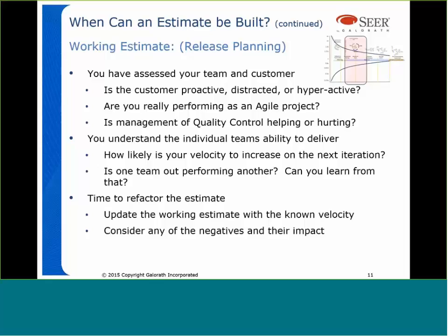A lot of organizations with quality control, they feel kind of left out, especially in the mil-aero world. The QC guys, the quality assurance folks, they tend to feel left out, and they want to get their fingers in the pie. One of the most brilliant things I've seen done was a very large aerospace company down in Texas. What they did was they sent their quality control folks, the QA folks, to Scrum Master training. And they actually turned the QA people into Scrum Masters. It was brilliant because now you have the quality assurance folks bought into what they were trying to deliver. They were actually available to help influence the project rather than just hit their little check boxes on their sheets of paper.